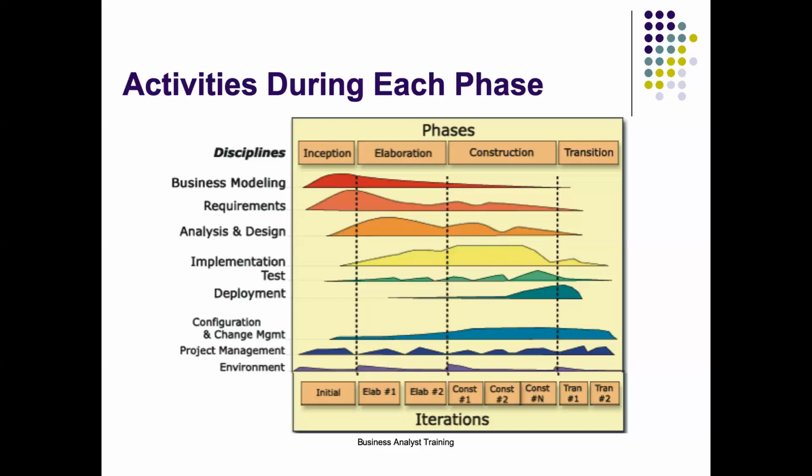Multiple things, as you can see, are going on parallelly, right? There is one more level of complexity here. So there is a thing called iterations. So if a project, let's say, is 10 months long, in typical waterfall, you will say, okay, I will do the requirements. First 2 months will be requirements. Next 2 months will be design. Next 3 months would be your development, and then 1 or 2 months testing, and finally hand off for implementation. Right? That's how you will break up in a waterfall.